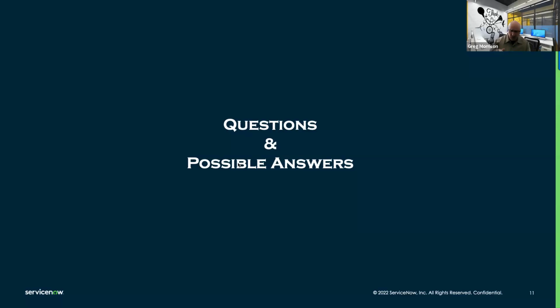Yeah, it's a good question. So here's how they work. Every team, so think of it very much like a FICO score. Every team starts off with a score of 500. For every successful change they do, the score increments. For every unsuccessful change they do, it decrements. So it's almost like a running score. We have a historical job out there that gets loaded as part of the plugin that you can execute that tells it how far you want to look back when you basically activate change success score. So you can say, I think the out-of-box configuration is 30 days, if I remember correctly.